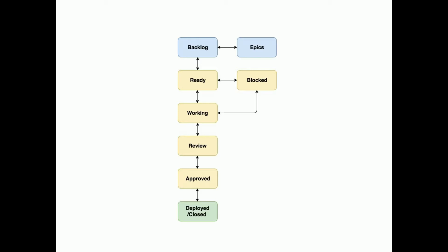And then so from there, I go down to Ready for Dev, same thing. But what you'll see here is I have a block status available at the Ready for Dev level instead of just the working level. And that's because a lot of these tickets, it's just all about dependencies. They had something that it couldn't go through. And so even though I had everything ready that the developer could grab it, technically, they couldn't because it was dependent on another issue moving through the process first.